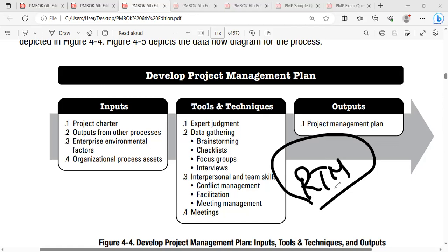In it you can see the complete information about the requirements. You are able to track and trace the requirements life cycle until it is converted into a deliverable. This kind of traceability is called forward traceability.